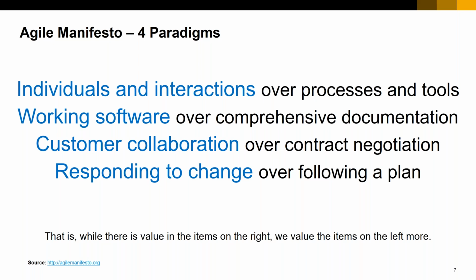So if we make a release plan, for example, it doesn't mean that we will only deliver the features that we have committed to. Responding to change matters. For example, for the product that I am currently building in my organization, there was an acquisition that recently happened, and we knew immediately that some aspects of what my team was planning to develop already existed in the new company that we acquired recently, right?